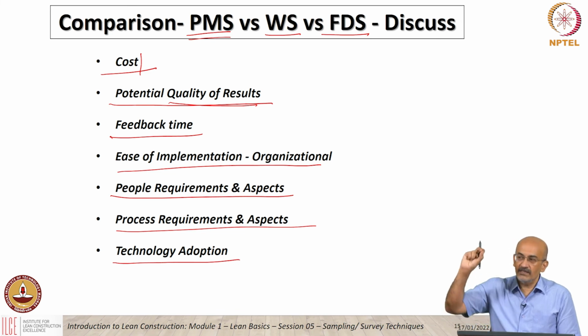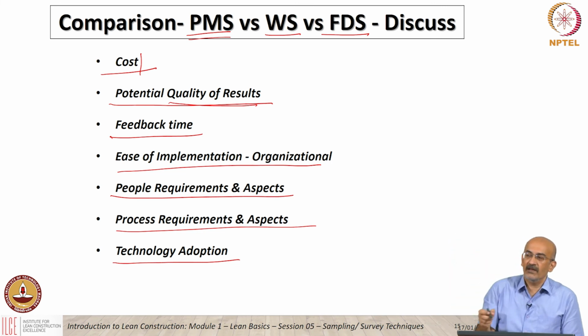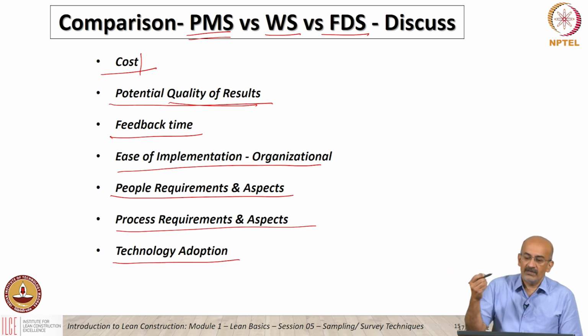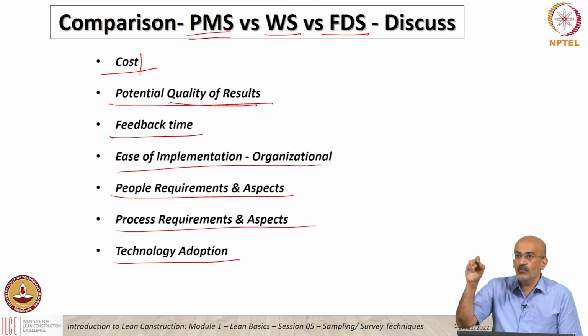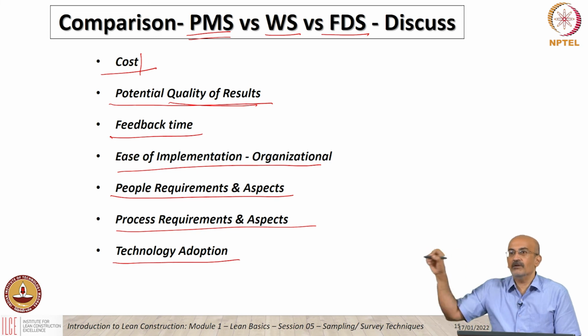The project manager will be given summary reports, for example, a work sampling report. If a project manager is required to drive it and implement it, yes. But the usage of work sampling results should ideally be at that planning execution interface, more towards execution, because it's a short cycle monitoring. It's not a long cycle monitoring.